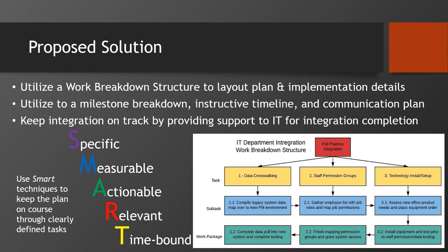First, for full practice integration, the main tasks are the data crosswalking, the staff permission groups, and the technology installation and setup. The subtasks that go along with this is compiling the legacy data from their previous system and mapping it over to their new patient management environment.